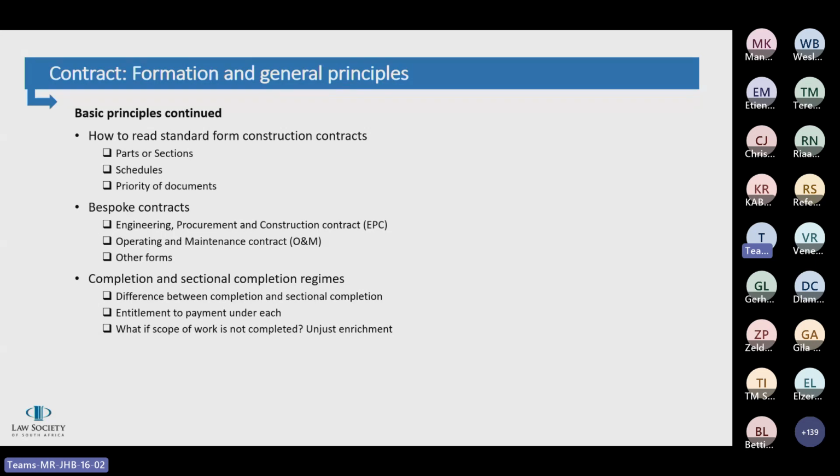So, just to give an example, if you look at Medupi, there are a number of boilers. So each boiler could have its own sectional completion date. Once the one boiler is done, that could be commissioned and start up, whilst the other boilers are still under construction.